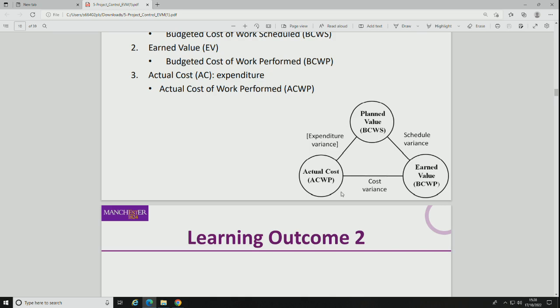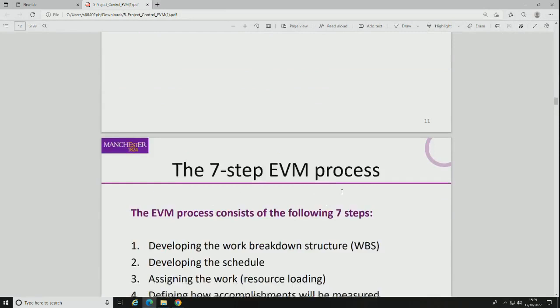And then you've got the budgeted cost of work scheduled, which is basically you would say you would do this on this date. You planned to do this, based on reasonable assumptions and a basis of estimate. But anyway, you said you would do that. And then there's the earned value. So how much work has actually been done? How much of my software is finished? How much of the engine has been assembled? How much of the new technology has matured to technology readiness level, prototype level, depending on what the project is? So it's those three things which enable us to work out whether the project is under control or not.